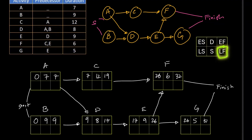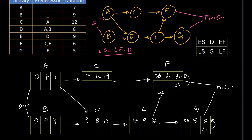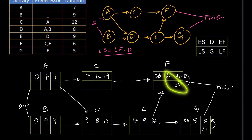For the backward pass, the LF for the finishing activities of the project remains the same as EF. There are two finishing activities — F with 32 and G with 31 — so their LF values remain the same. Next, we find LS. The formula is: LS equals LF minus duration. For G: 31 minus 5 equals 26. For F: 32 minus 6 equals 26.